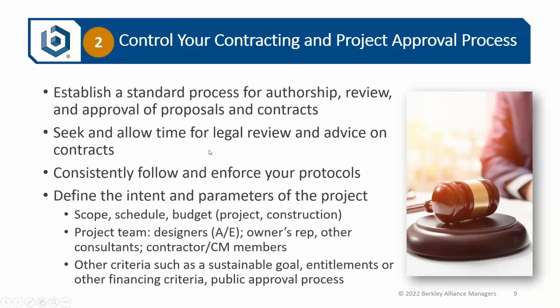And then you need to get into the legal terms and conditions. It is recommended that you include your standard terms and conditions with the proposal so that your client understands what you're going to be expecting when you get into the contract negotiation. But you need to allow sufficient time for legal review and advice on contracts. If you're a larger construction firm or construction manager and have a devoted risk manager, contract coordinator, or maybe even an in-house general counsel, that's going to help you be efficient in that regard. If not, make sure you utilize the services of your outside counsel.